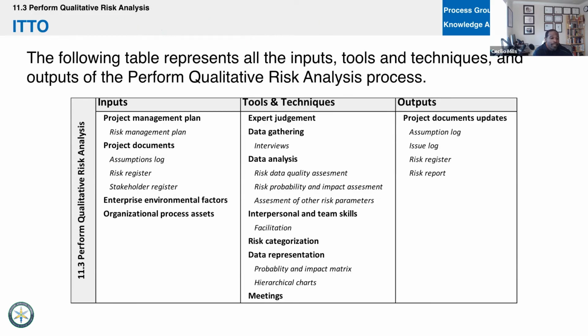So we'll take the risk register that we just created as an input, and we'll use these tools and techniques. We'll analyze the data, and then we'll represent it. And the whole goal is to update the risk register and update the risk report. That's all we're really doing here.